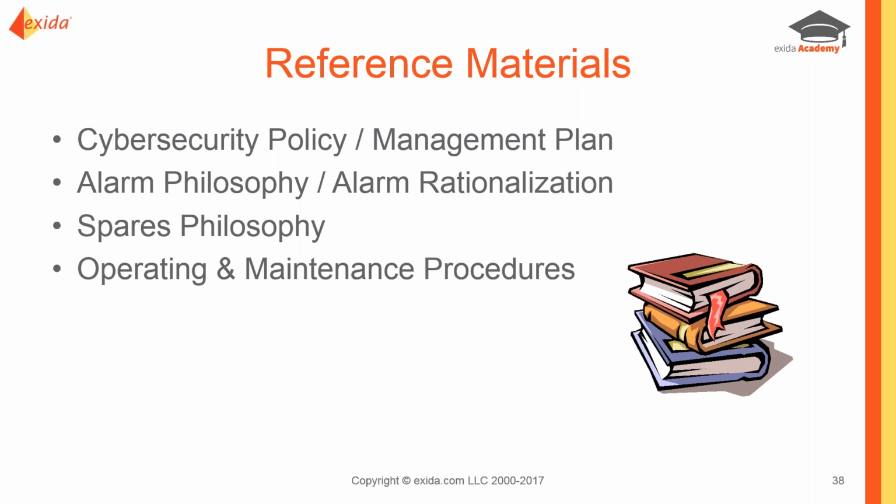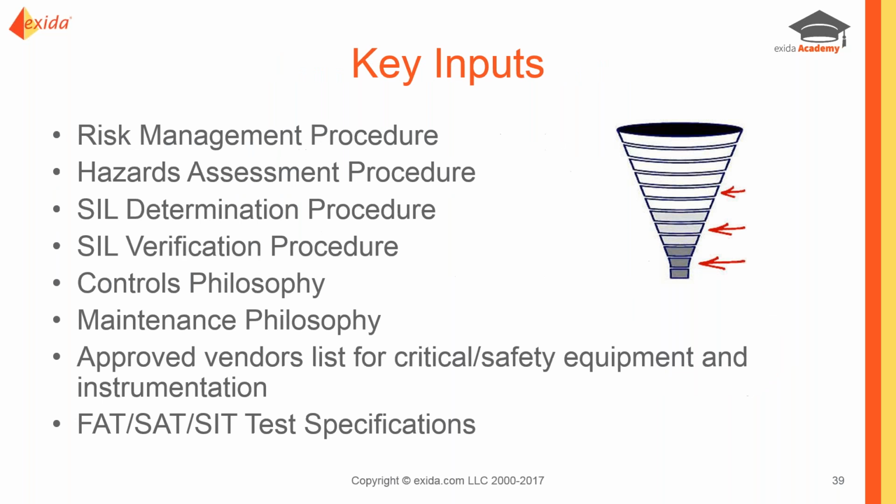If spares are kept on site, that's obviously one time frame, but if the spares have to be shipped from, say, a central warehouse and the delivery is 2 days, that's a different time frame. So we need to understand what that philosophy is, and of course specific high critical spares may be treated with exceptions to that philosophy as part of our plan.